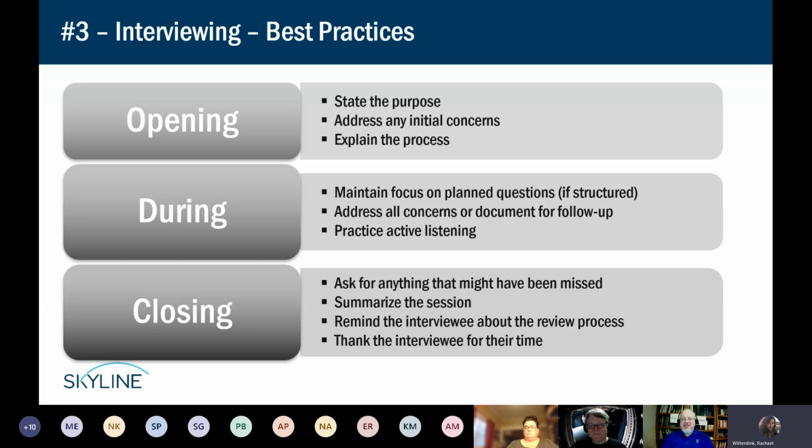And then one final tip that I do is I also ask, is there anyone else that I should talk to? Because sometimes you could miss a stakeholder despite all of your best efforts in conducting your stakeholder analysis. Somebody might have that tribal knowledge and you don't have that anywhere in an org chart or anywhere else. So I always ask that question too.